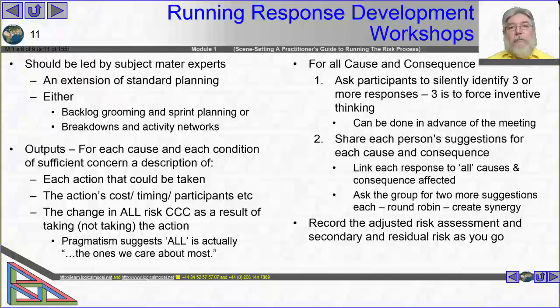The numbers are multiplying very rapidly potentially here. So I'm again back to saying, if we can divide this by discipline, and if we can divide this by seniority of person required to authorize, then that may be a pragmatic way of having more coverage. We're going to have to identify the stuff that's highest priority first, if we are being faced with large numbers of combinations. And we need to do our record keeping, record the assessment of the risk.